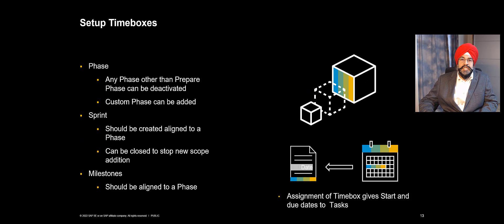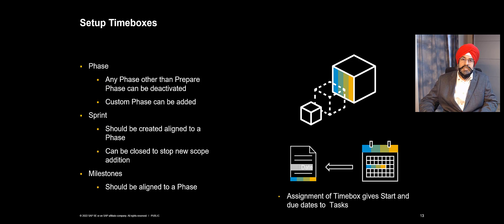Then let's talk about setting up the time boxes. Time boxes include your phases, sprints, and milestones, and each one has a different purpose. You get a predefined phase list from SAP Activate methodology but you can easily extend it by adding a custom phase. In case your project is about a specific time frame — for example, you are only in the realize phase — you may also want to deactivate the existing phases. That can be done easily via a UI option.